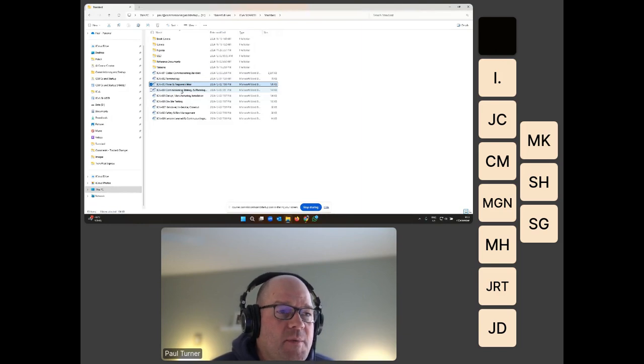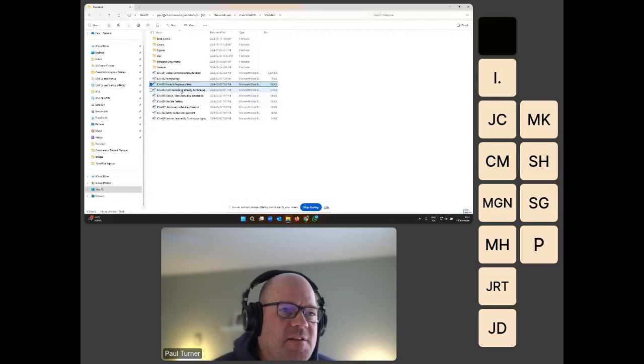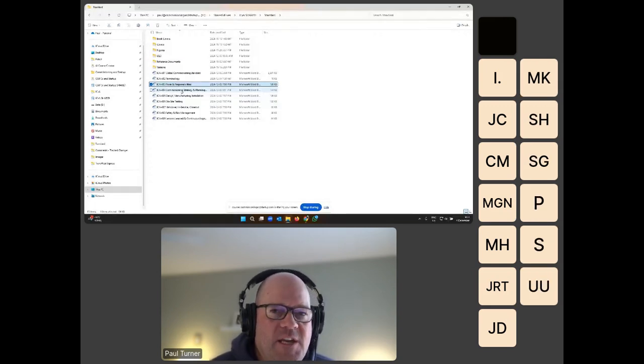So the first document, the project commissioning plan, really defines what needs to be done. And then your commissioning execution plan defines how you're actually going to do that in the specifics: the specific tests to be done, the specific definition of each mechanical completion and handover from construction to commissioning.